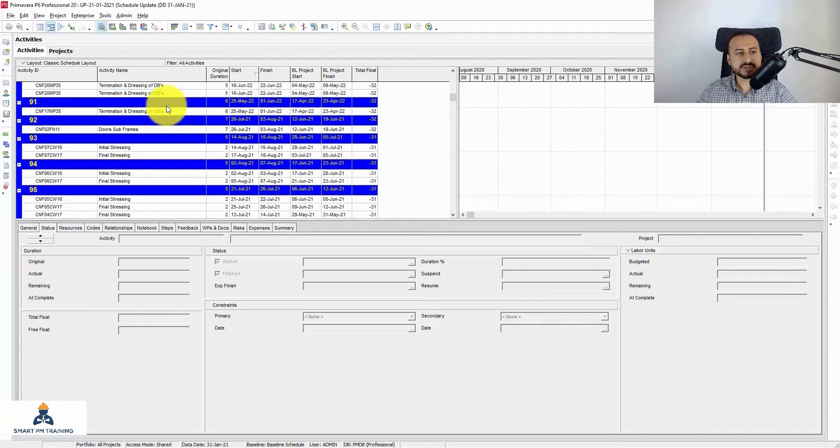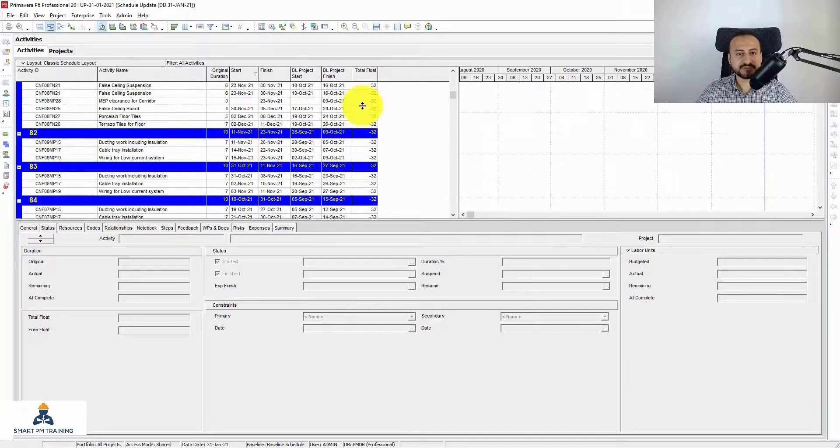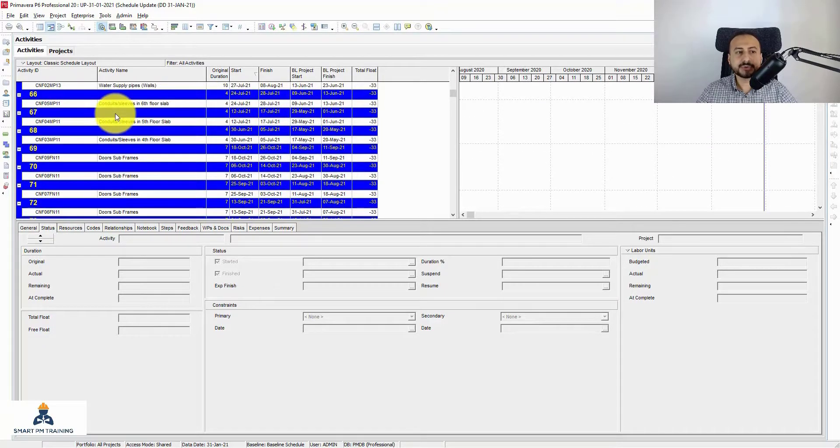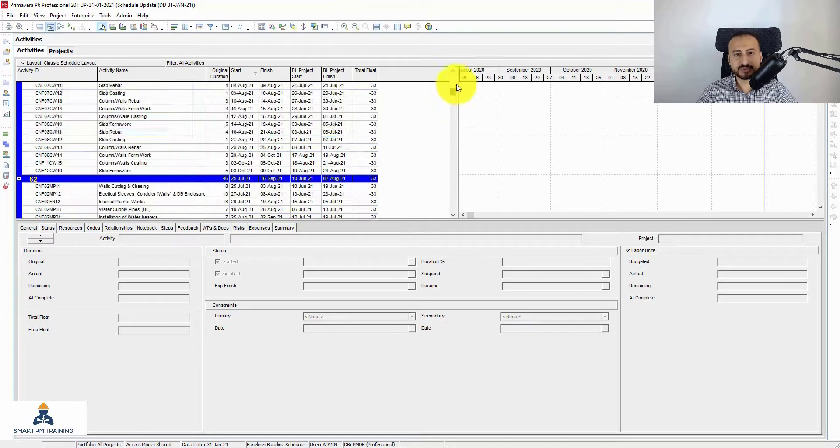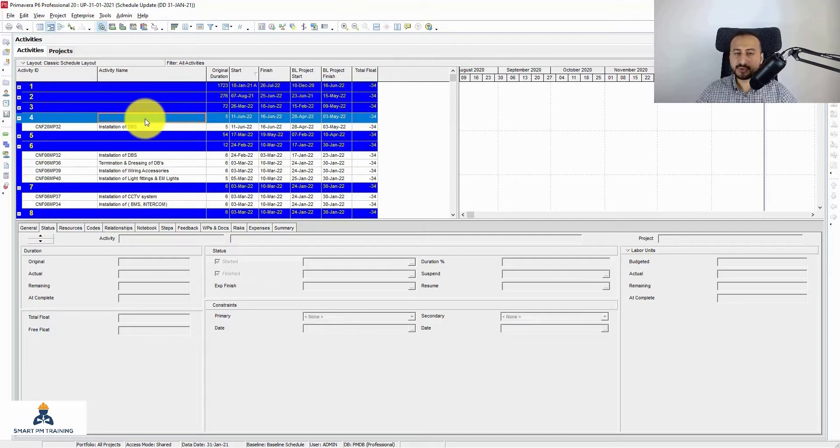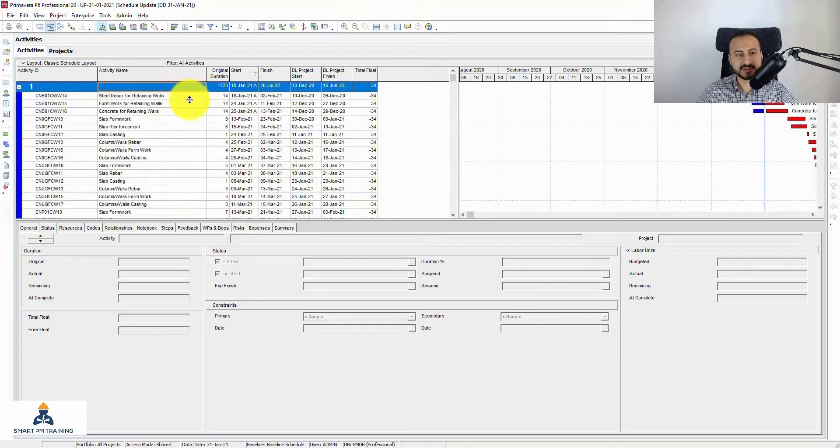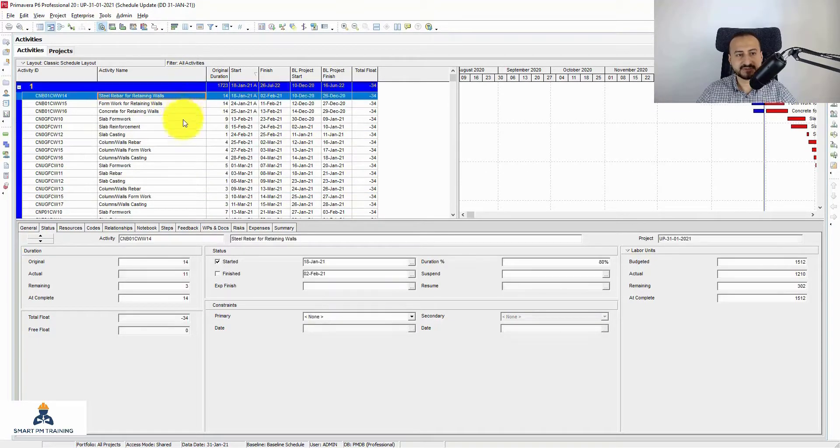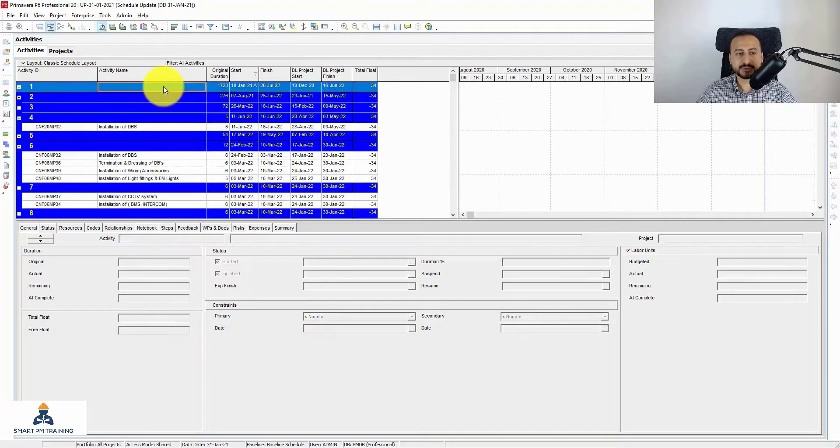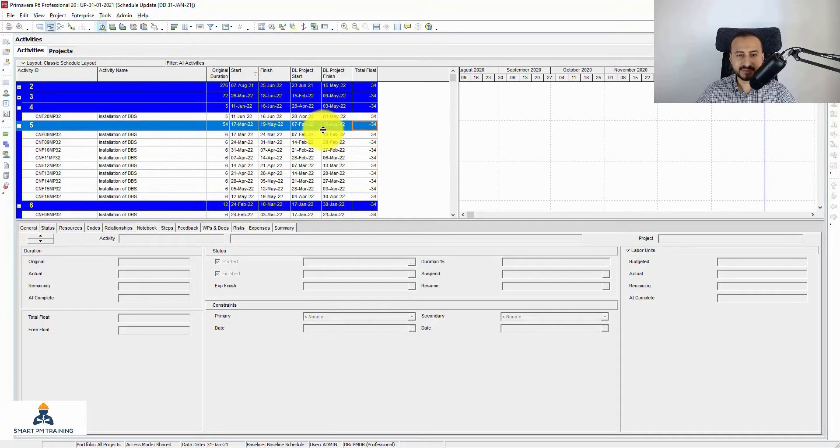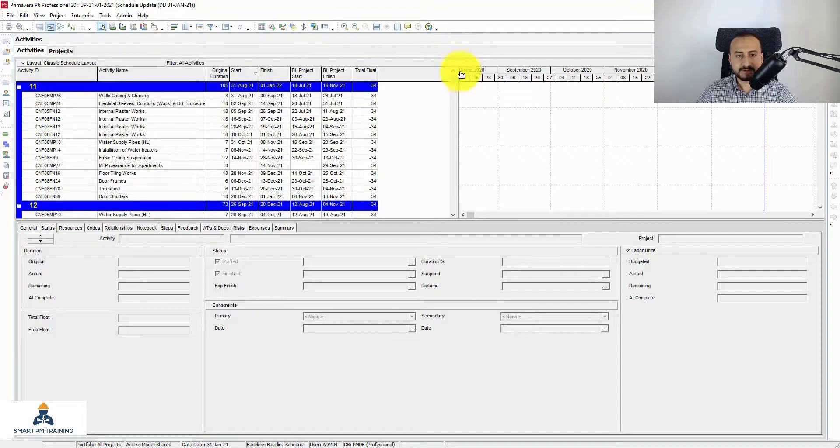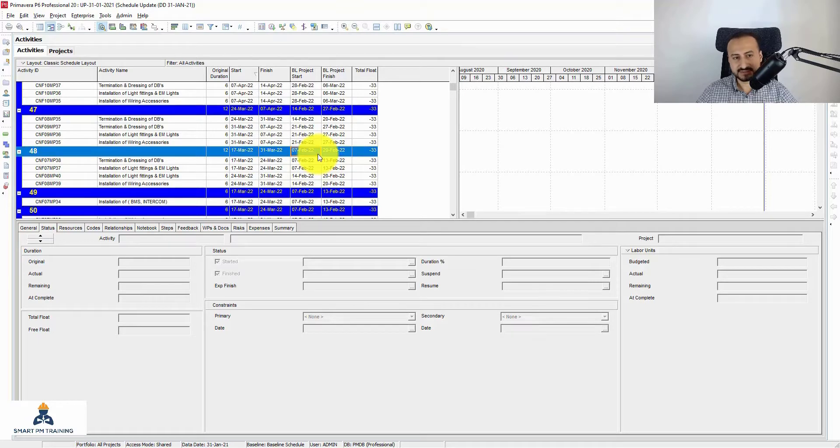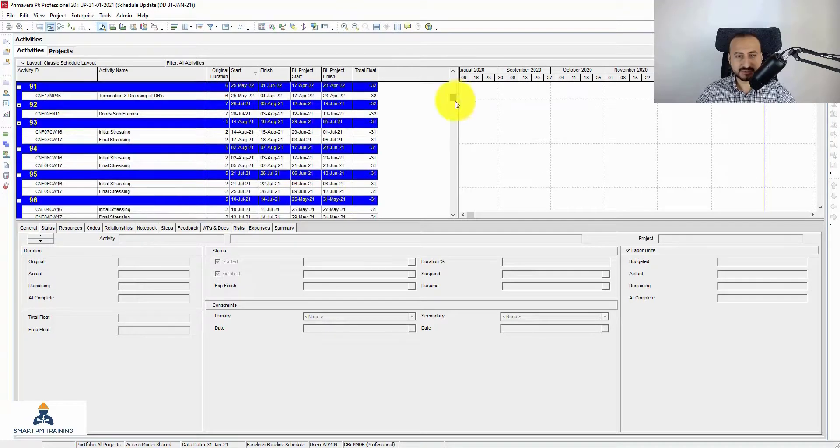You see, so you will have now different total float values. When you group the schedule by total float, what Primavera does here is they will group few activities which share the same total float amount. So all this path here, it's negative 34, they are all linked together so they grouped them under one path. Same for here but maybe different links. And you can go all way down until you see 33. So now it's another path. It's less critical.